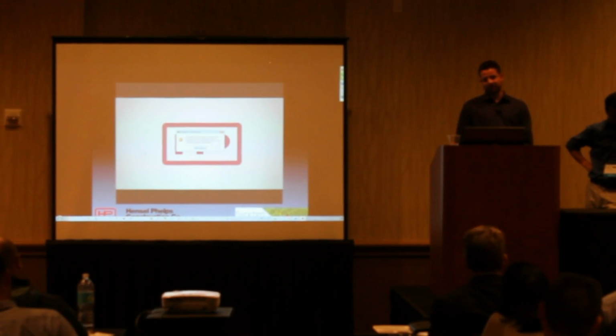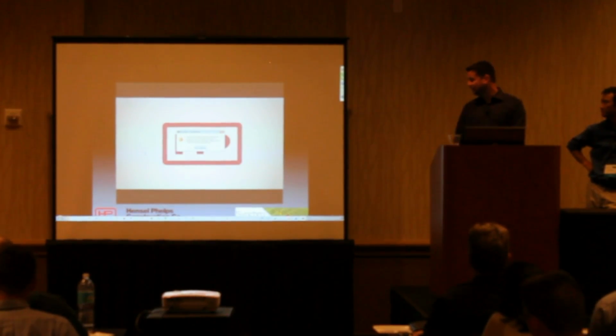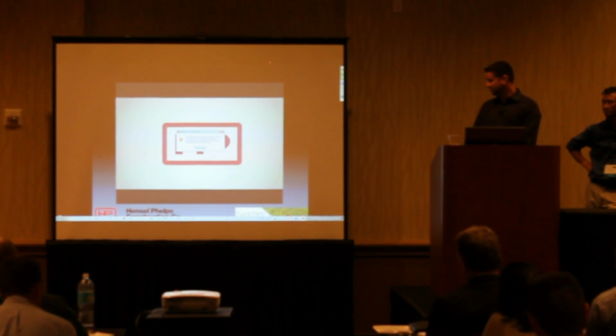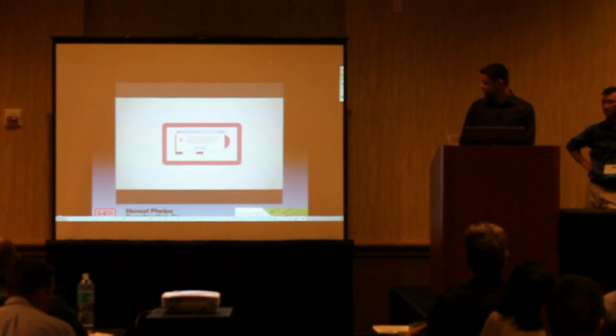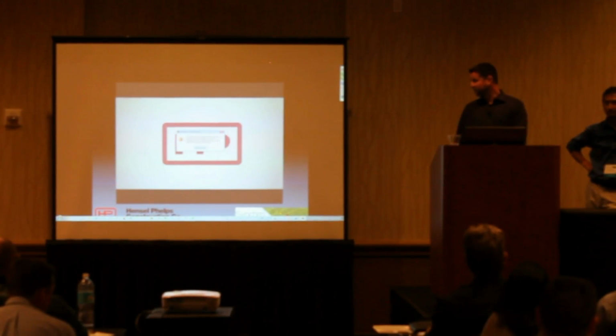Some of the other things on this project: I mentioned that 2012 date, August. They accelerated us and paid for two months of acceleration. But in addition to that, we're going to finish this project nine months early. So they paid for two, and we're seven months ahead of that. This project's actually going to finish on February 15th, next month.